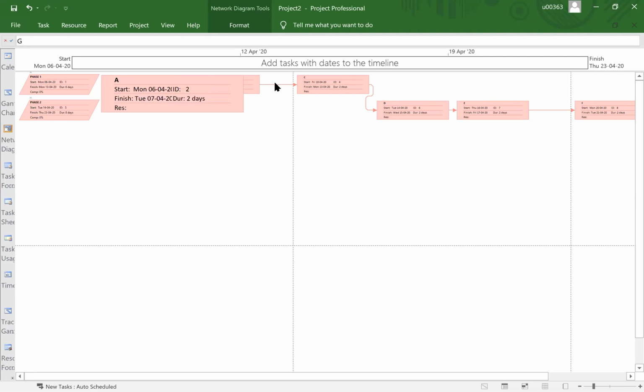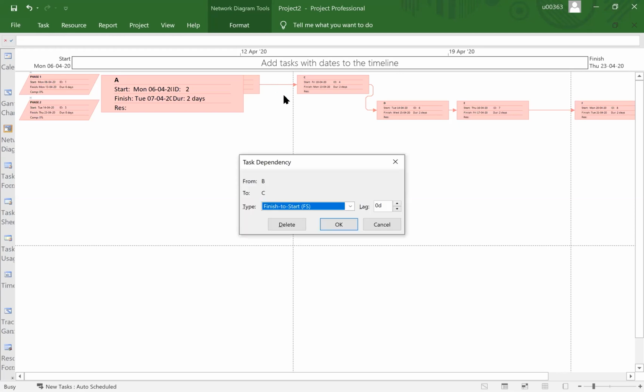It is a bigger arrow there. If you click on the arrow here, double click. Okay, that is the issue with my mouse. Now, if I double click on the arrow, remember in PDM diagram or AON diagram, the arrow simply indicates relationship. You see, task dependency. Dependency meaning to say relationship. Now, it is in the mode of finish to start relationship.